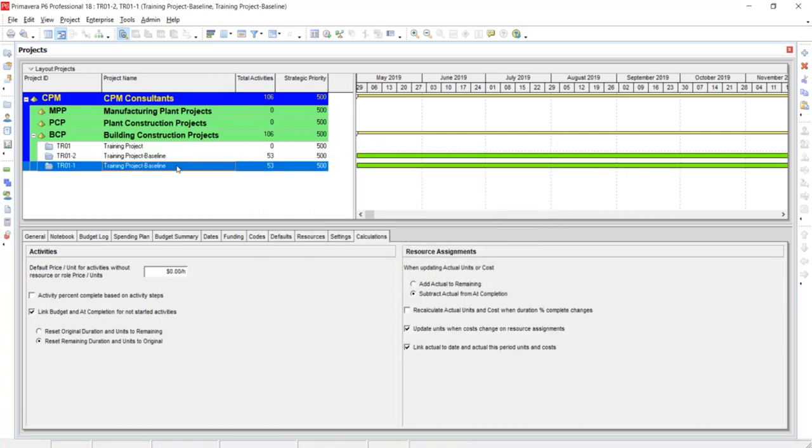After successfully copying the plan, I am going to rename it as the first update, and I am going to mention the date here as well. Suppose I am updating after 20 days, so I am going to change it to 20th May for my reference, so that I can be familiar with up to which time I have updated this progress.